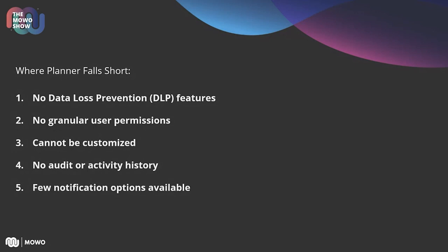Which takes us to granular permissions. Can you restrict people from deleting things or editing things that they weren't supposed to? And the answer is no. It's a resounding no. There is no ability to restrict what people can and cannot do inside of a planner board. It is a free-for-all, which means it's a pretty disposable board, because it's great for those small projects. But if you want to do something really big and a really complicated project, you're going to outgrow Planner very fast.